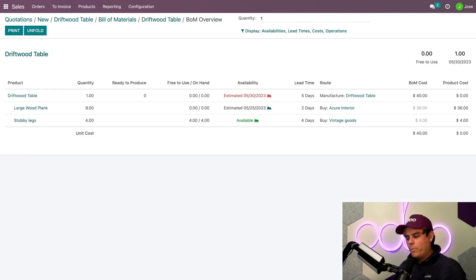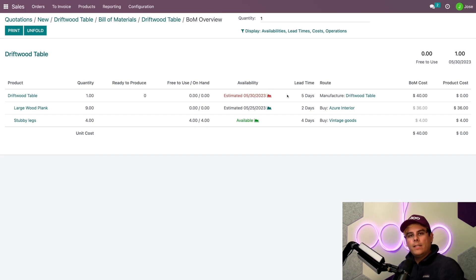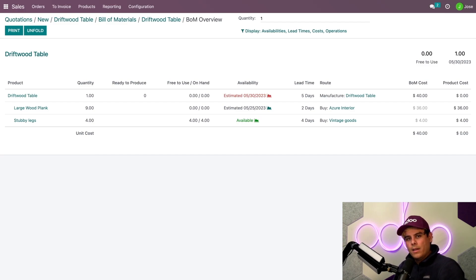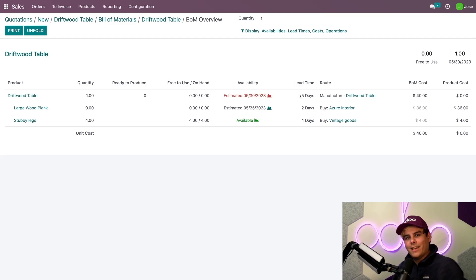The date's right there. The finished table will be ready in seven days — two days earlier than the forecasted date I showed you before. And that's because I have all of the table legs in stock, so I only need to wait two days to prepare the other components. Combined, we get five days to manufacture the table, and then we can finish it in seven days.